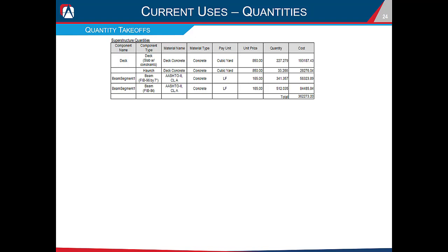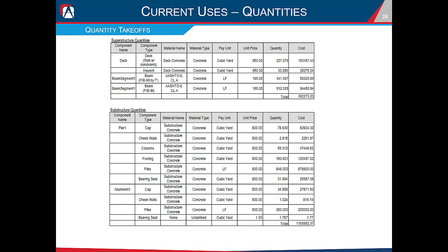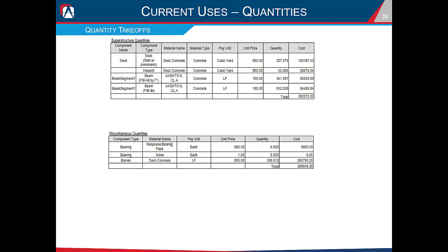The last main current use for OBM is quantity takeoffs. OBM does a very good job of breaking down quantities into different categories: superstructure quantities broken out by deck and haunch concrete, beam lengths, and diaphragms; substructure quantities broken out by cap, column, footer, cheek wall, beam seats, and piles; and miscellaneous quantities such as bearings and barrier wall. OBM also has a customizable material library that can be cost-loaded to produce quick cost estimates.